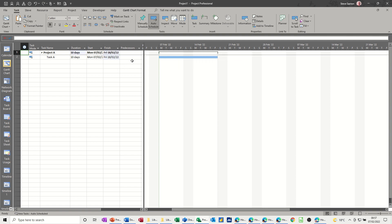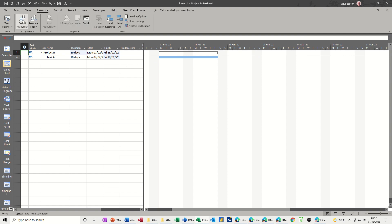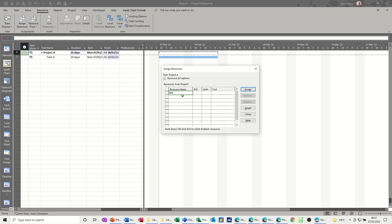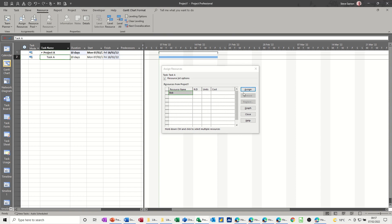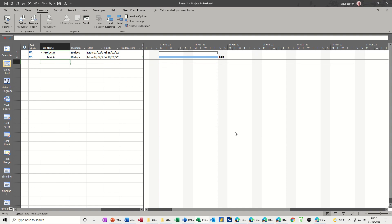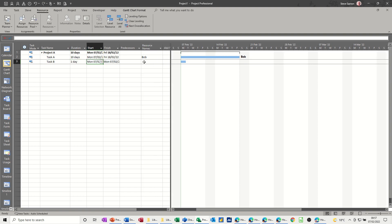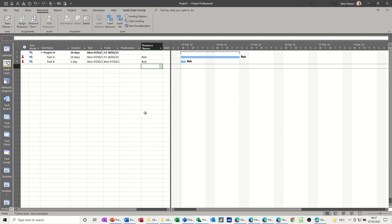Now let's just add a resource and see what we can do with this. So if I go to Resource and Add Resources — I've only got one, which is Bob. Let's assign him to this task. There's Bob on that task. And then let's do a Task B — I'm going to have this as a one-day task and assign Bob to it again. I'll just type it in there: Bob. Bob's on both tasks and he's now over-allocated.